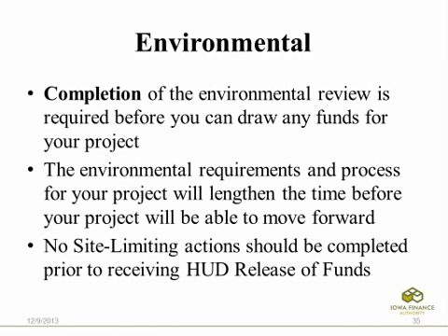As far as environmental is concerned on a rental project, completion of the environmental review is required before you can draw any funds for your project. The requirements and process will definitely lengthen the time before your project will be able to move forward, and you should not do anything that limits your site prior to receiving HUD release of funds on a project.